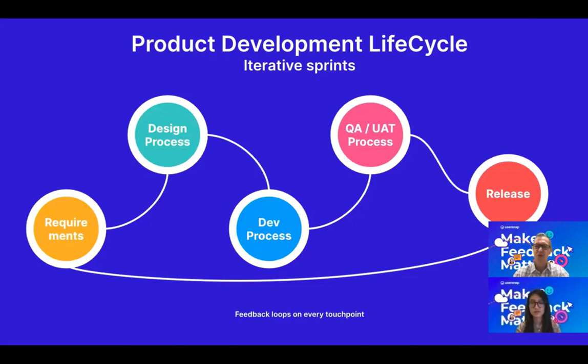And that is why new approaches came. And these new approaches are agile processes. And these agile processes are already happening in the product development lifecycle. So what does this mean? The agile processes cut this long, traditional model down into sprints. And these are 2 week sprints and iterative processes where you have little loops in the product development lifecycle,